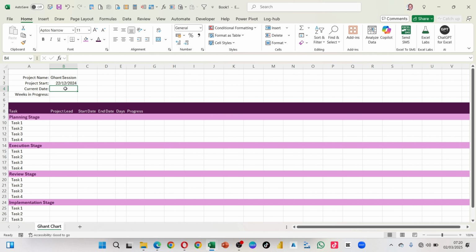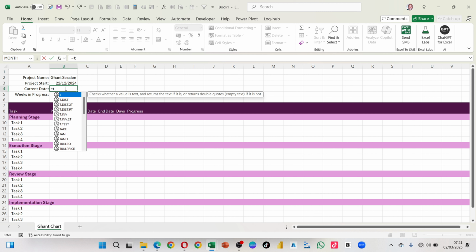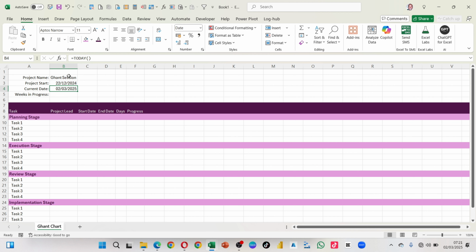So here I will go and put the current date, which is equal to today. We use a TODAY function. Tab, close parenthesis, and there we go. So the video we are recording this on 2nd of March. Then I will have the weeks in progress. So weeks in progress, I will do today minus when this project started. So between the day the project started and today, this is 70 days.